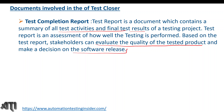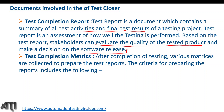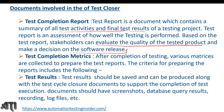All documents provided to the client at the end of the testing phase are very important to evaluate the quality of our testing. Another document is the test completion matrix. After completion of testing, various metrics are collected to prepare the test reports — including the number of test cases authored, test coverage, execution percentage, how many test cases were executed, pass/fail counts, how many defects were raised, and the defect rejection rate.